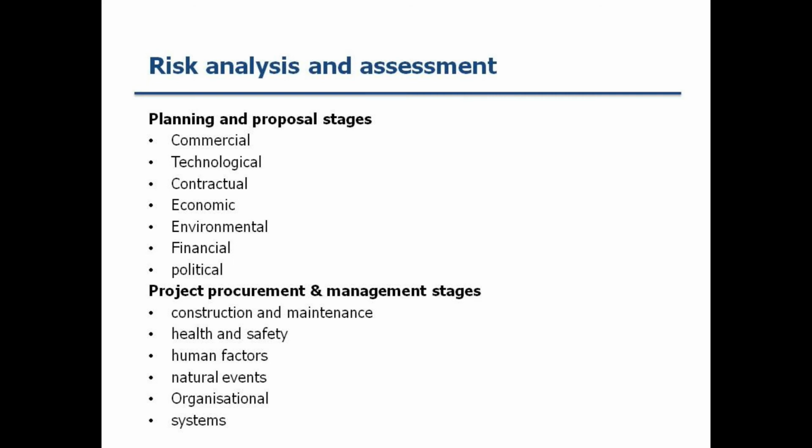In these summarised points I've got here, in planning and proposal stages, I've identified political or environmental, and that those will vary. If you've got a project that is in a highly sensitive environment, it might be the Barrier Reef or a protected wetland, you're going to have both political and environmental risks associated with operating that project.